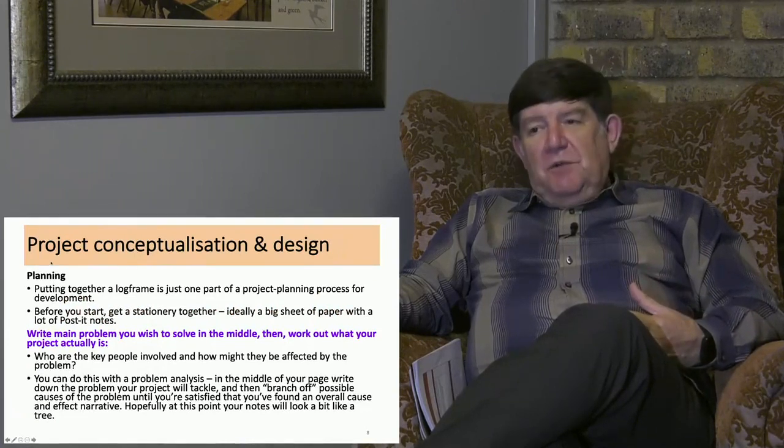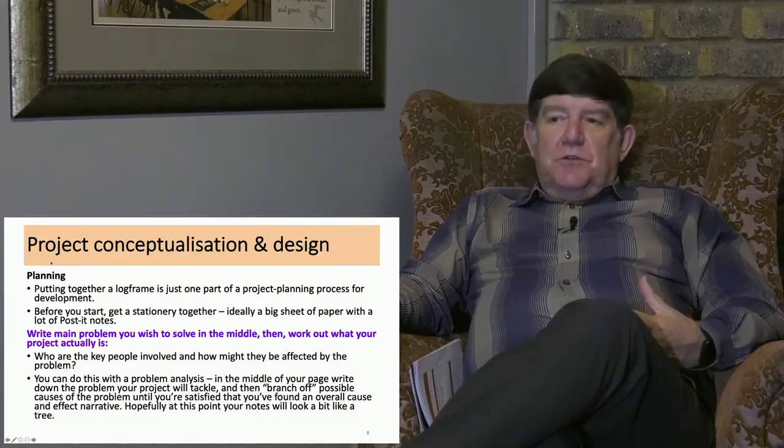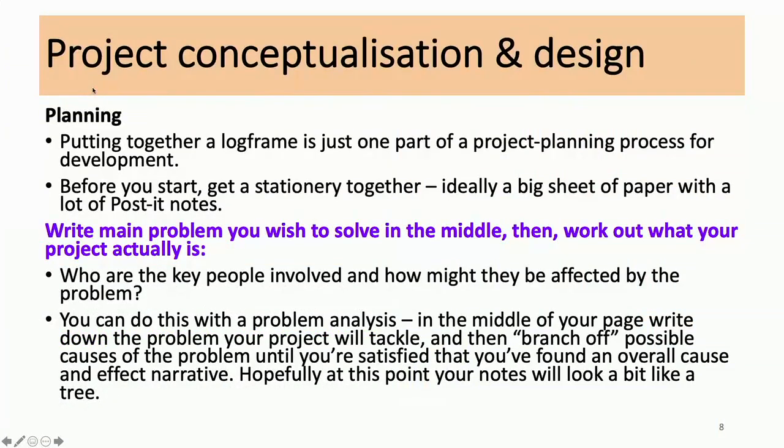One of the key documents, the first document that you need to complete for your project, is the so-called log frame. A logical framework is one part of the project planning process. Before you start, I advise you get some stationery together, ideally a big sheet of paper with a whole range of post-it notes. The approach to this is to create what we call a problem tree.